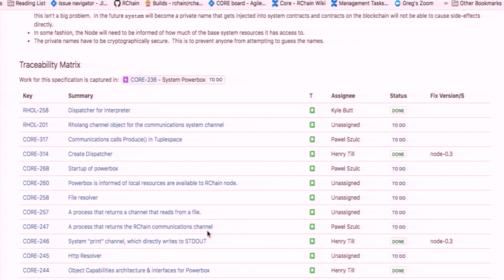So you've got the big vision of the feature, and that has to be broken down into small pieces. And each of those pieces get scoped into a release plan. And from the release plan, they wind up on the sprint board, right? So that's how you kind of trace it all the way through. So here you'll see some fixed versions, right, for some of the releases. That's how I keep track of how this thing is growing, how it's evolving over time. Any questions on that?